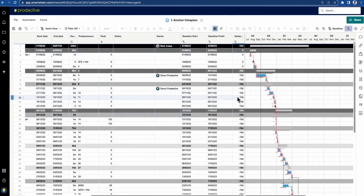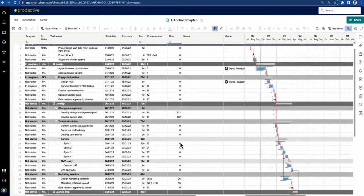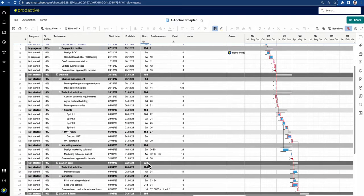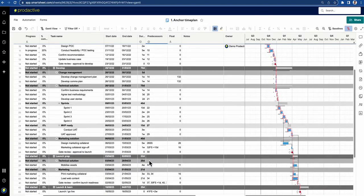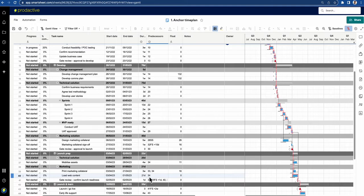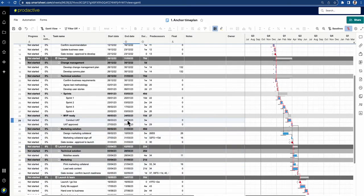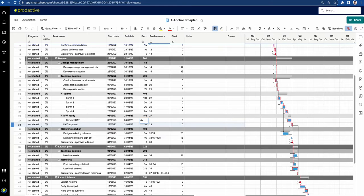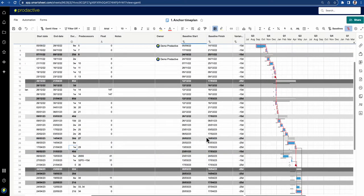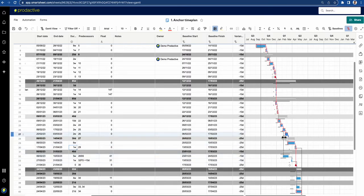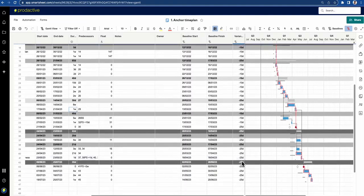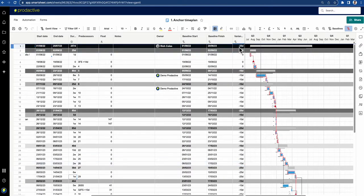The baseline is set, and you can see the variance — the knock-on effect on the project. If something else downstream changes — say 'user acceptance testing' goes from three weeks to six weeks — the variance column shows 25 days for anything impacted with linked interdependencies. Items not connected to that still keep their earlier variance of 10 days. Scrolling up, the total project variance is 25 days, and you can map this into dashboards.